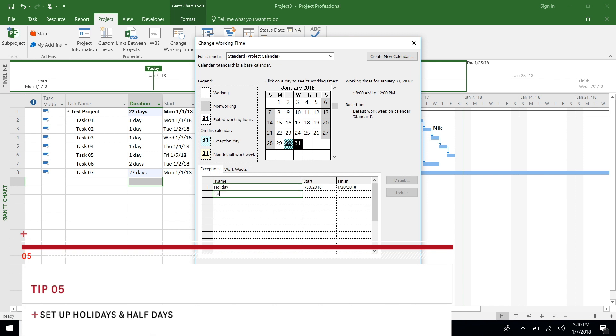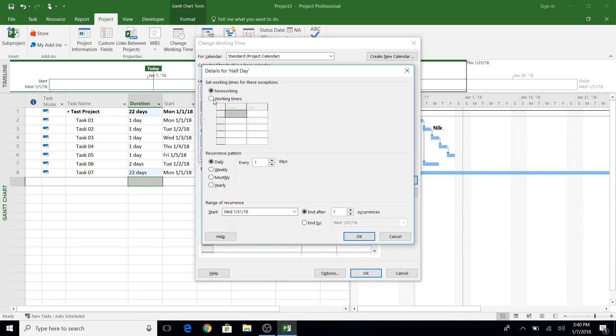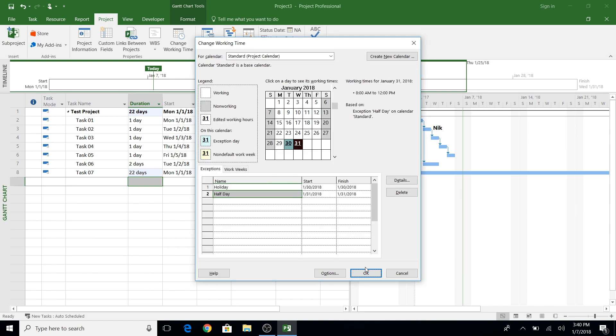Number five is in relation to the calendar — you can set up holidays or half days in the project standard calendar, or in the calendar copy that you can create for each resource. Those are the five tips that I would suggest you set up upfront when using MS Project, which will help you in the long run.